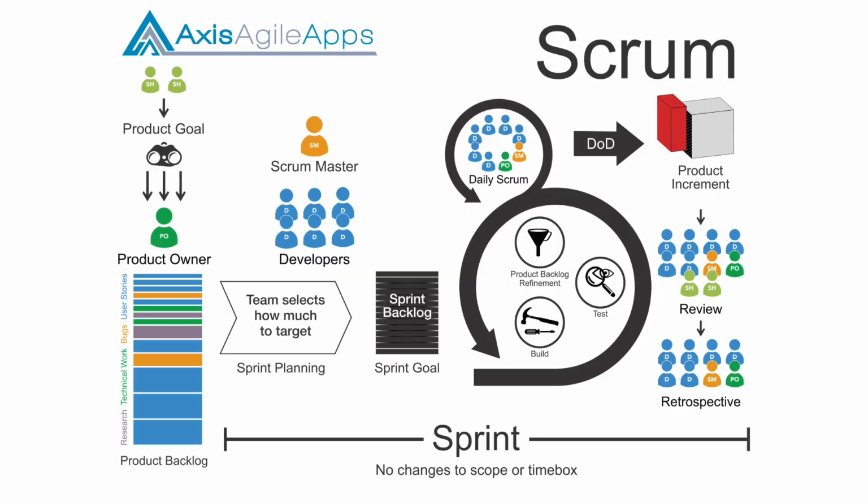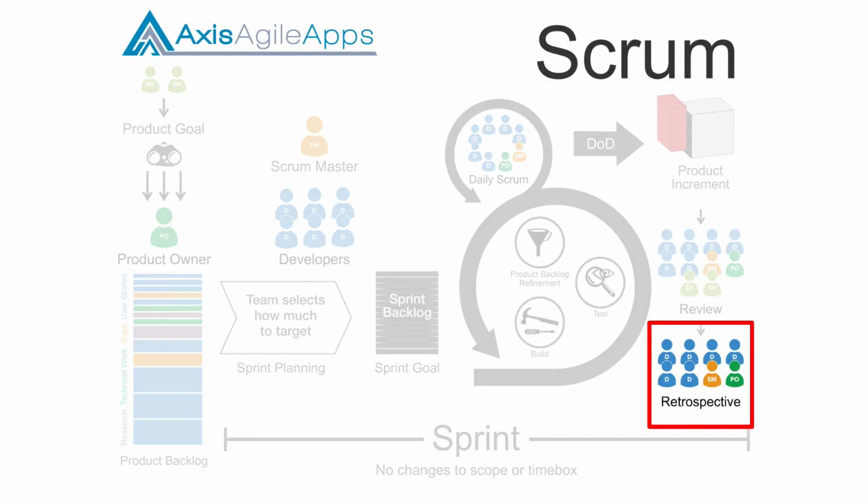Now, the sprint retrospective, on the other hand, is about inspecting and adapting the process. So this is about looking at how we're doing the work and trying to make it better. Now, this session is not done with stakeholders because we want it to be an open and honest session. We talk about what worked well, what didn't work well, and then adapt it accordingly. So you can see how they are different. Sprint review for inspecting and adapting the product, sprint retrospective for inspecting and adapting the process. So what I'll do next is let's deep dive into the sprint review and how is that done.